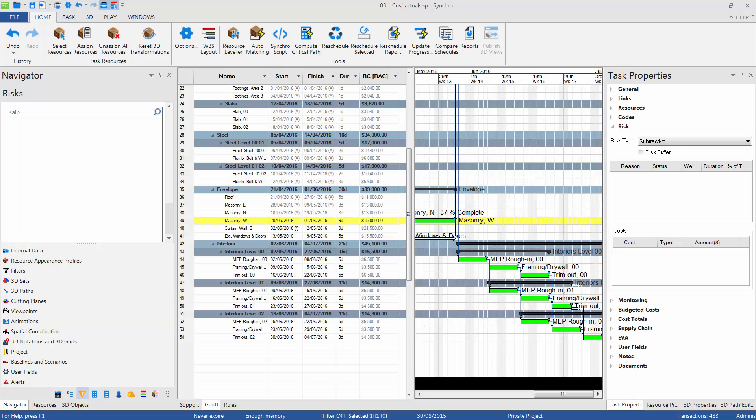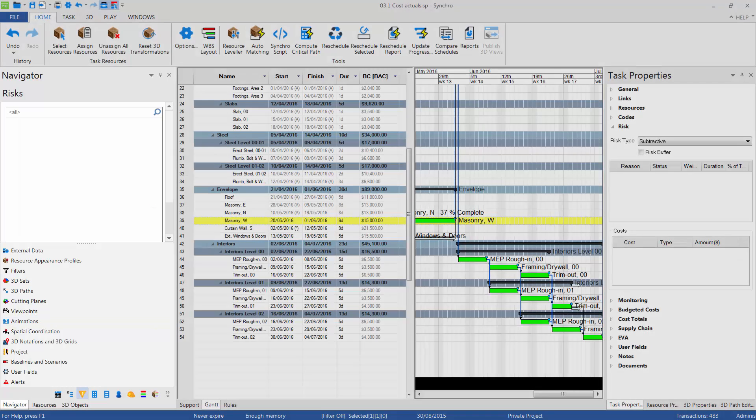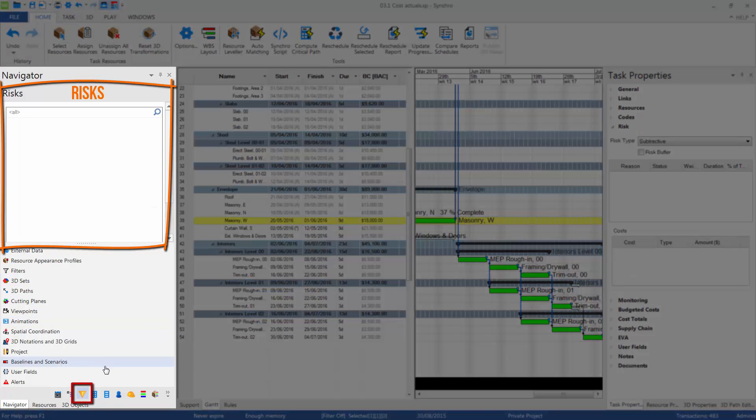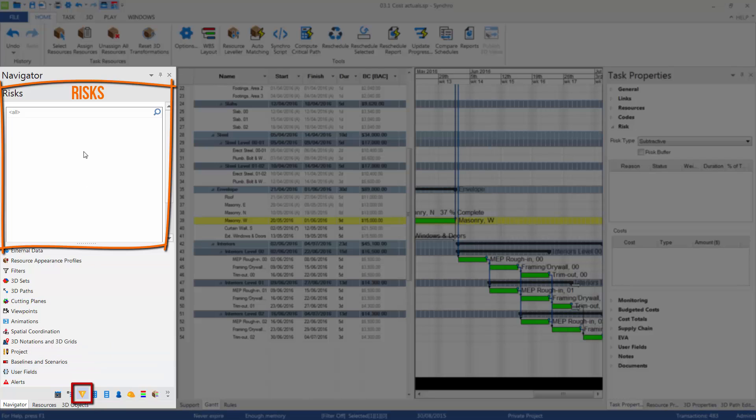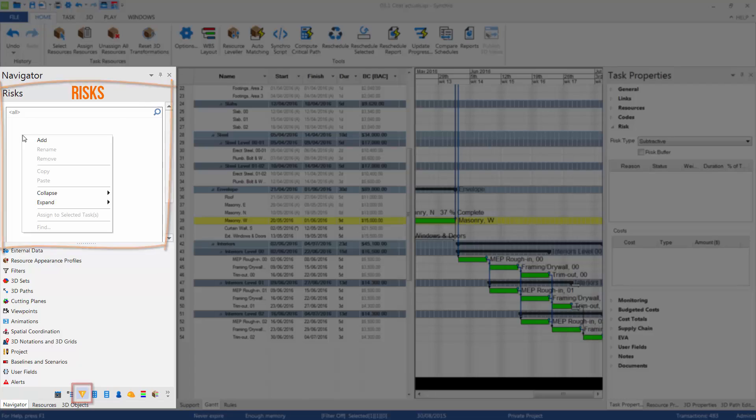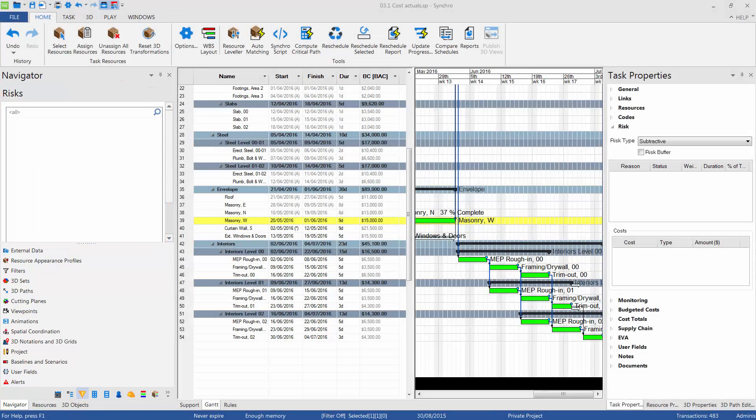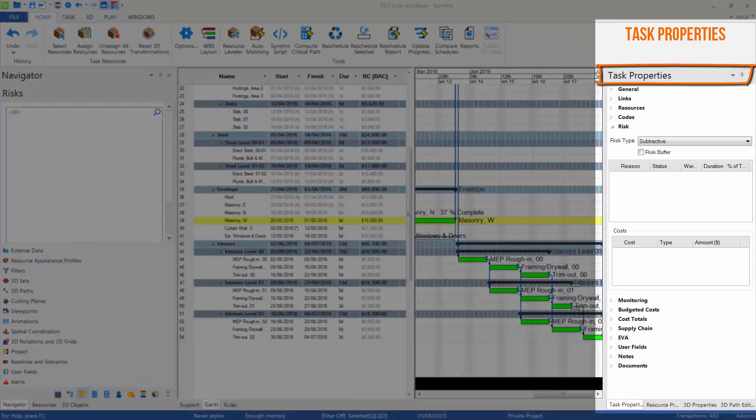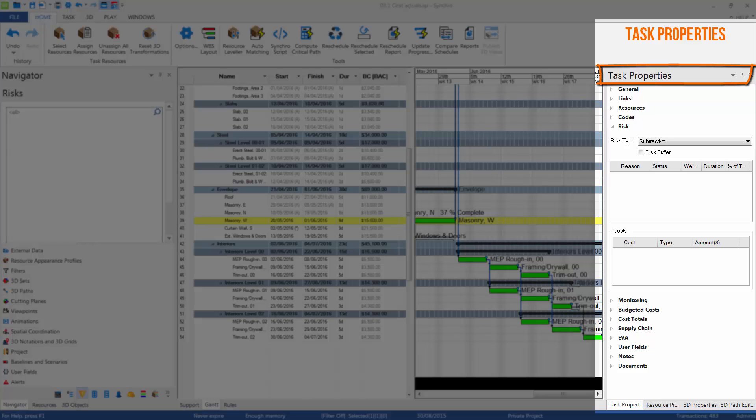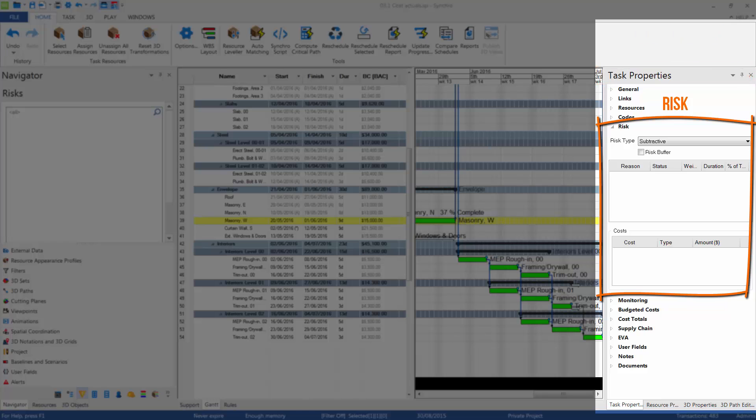In Synchro, we can define and classify risks in the Navigator window and the Risks tab. Predefined risks we can assign to tasks in the Task Properties window and the Risks section. Here we can also change attributes of risks, change the type, or assign potential cost.